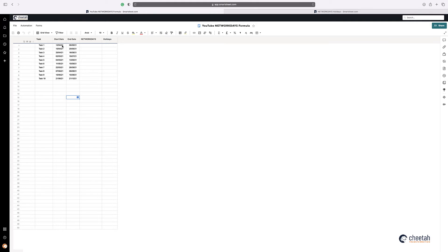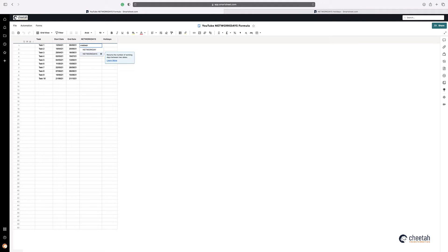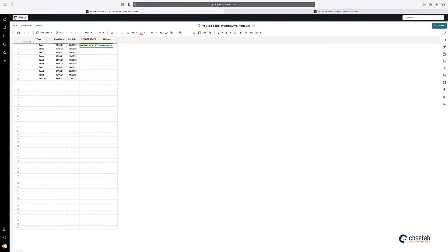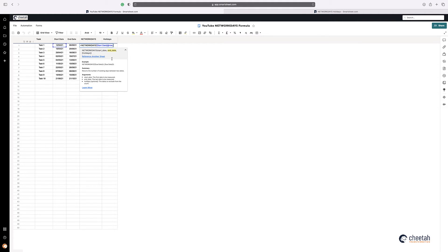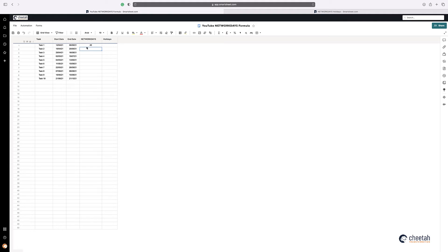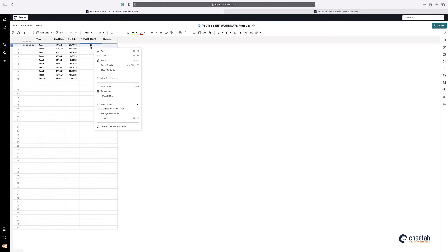So what you can do is just say equals Network Days, you highlight the start column, put a comma, and then you put the end date and press return, and then you have 40 days. You can make that into a column form if you wanted to.